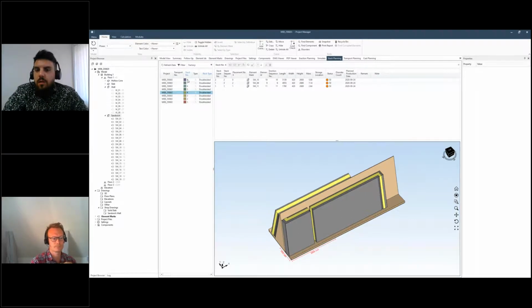The whole point of using a 3D transport planner is that you are going to save money by adding even a small little wall, even if it's from another project or from the same project, from behind of the A-frame. If you add another wall and you make the capacity close to 100%, and you can see that it fits, and you do that for every transport, one wall extra, then you already saved more than 10-15 transports in a whole project, which is a very, very big amount of money.